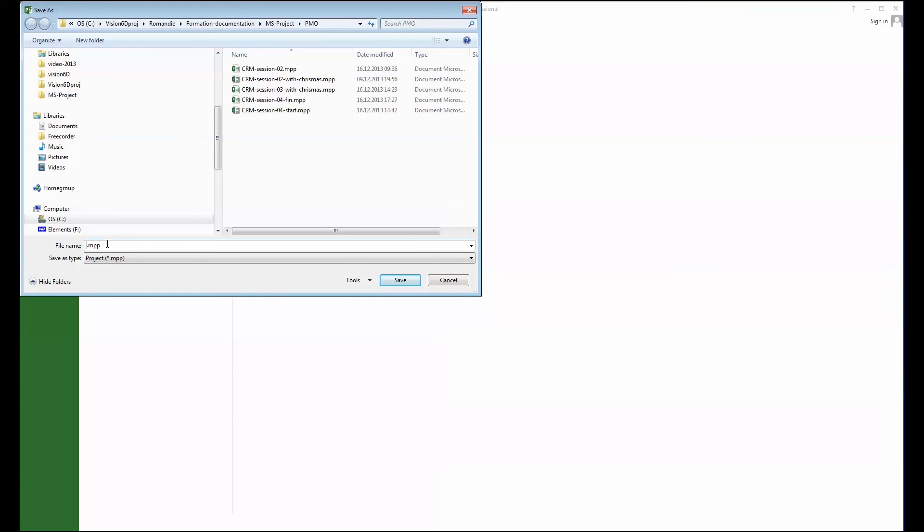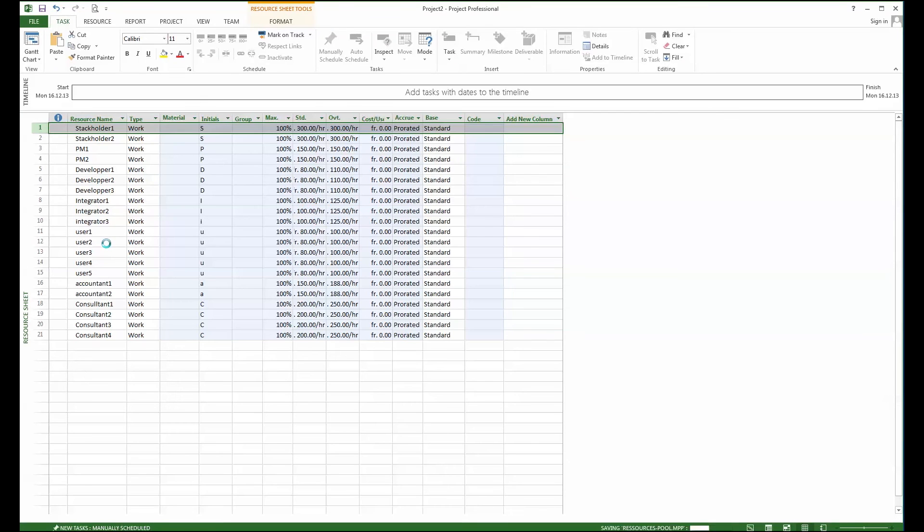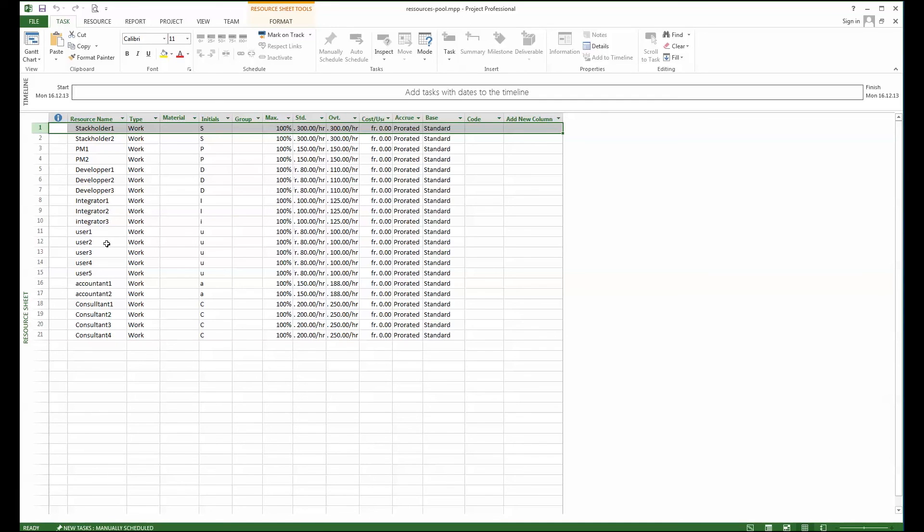And I'm going to call this resources pool. Now I can close the file, it's done and it's going to be available for other projects.